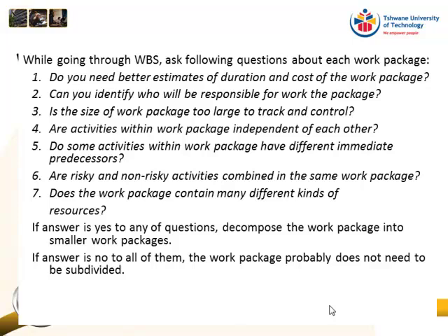Because if we say that we want to bring cold drinks for our stall, and Kamiso and Doctor will be bringing the cold drinks, on the day what's going to happen is there's not going to be any cold drinks. Because Kamiso is going to say, oh, but I thought Doctor would do it, and Doctor is going to say, oh, but I thought Kamiso was going to do it. So the better way would be to say, buy 2 Cokes and buy 2 Fantas. Kamiso buys the 2 Cokes and Doctor buys the 2 Fantas.